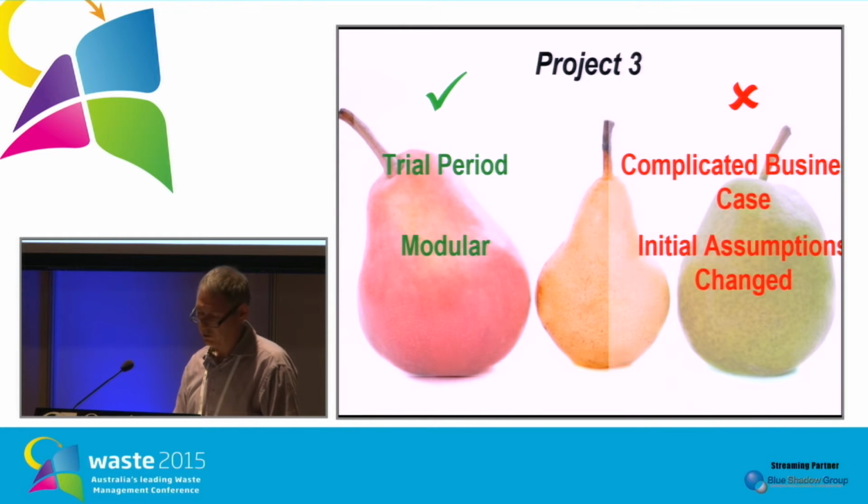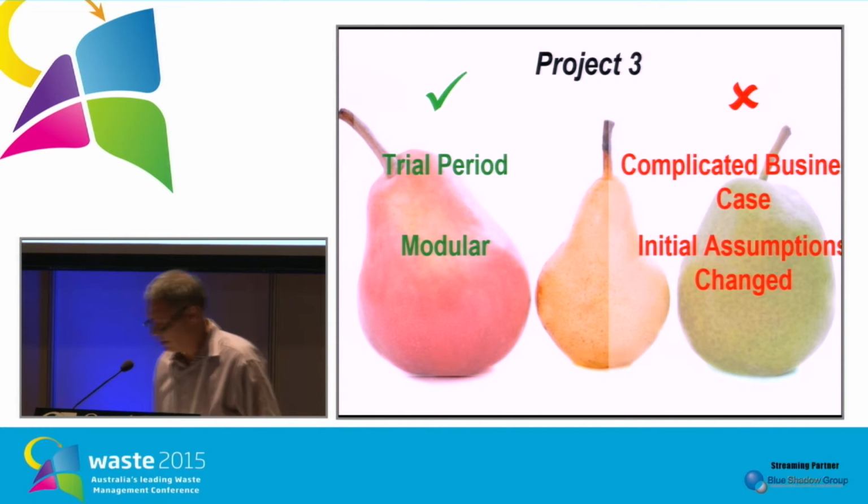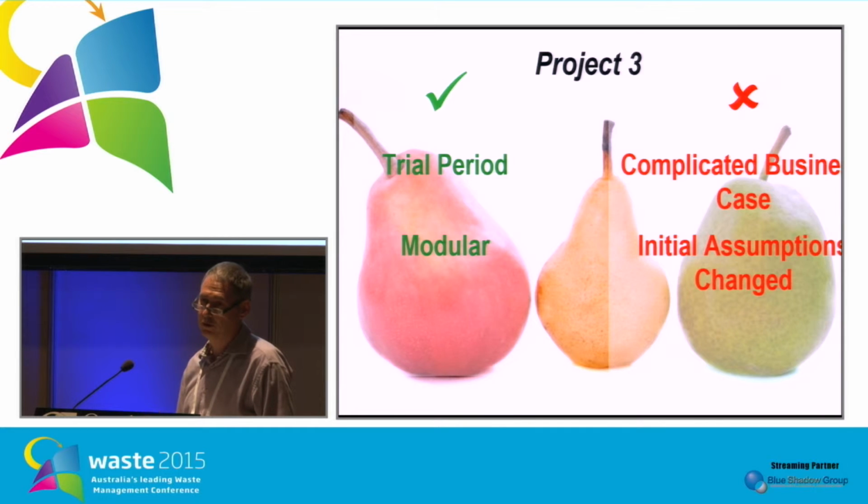Also, initial assumptions had changed in that the original business case, when they looked at options, had been built on the premise that landfilling was going to be a more expensive option. In this particular case, council went ahead and negotiated a deal with the landfill operator to get cheap disposal rates, which, in one instance, they'd actually done a good job, and in the other instance, they actually undermined this project. So they had that sort of issue of trying to work out whether this still was the cheapest option.